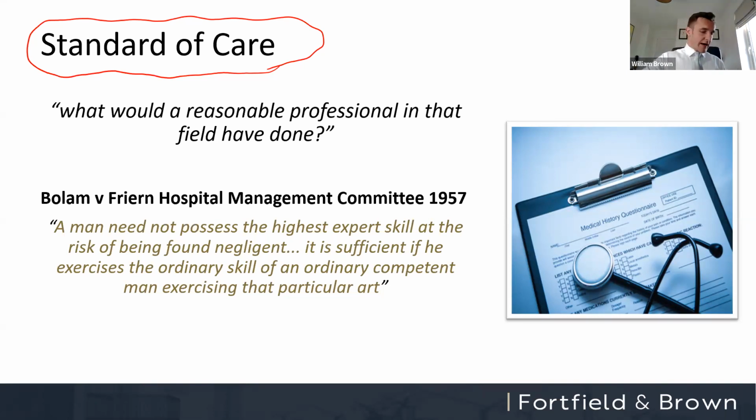You do not have to carry out the design perfectly, put it like that. You have to carry out the design to the standard that a reasonable professional in your industry, in your field, would have done. So if you're carrying out structural design work, the test is, what would the reasonable structural designer have done?